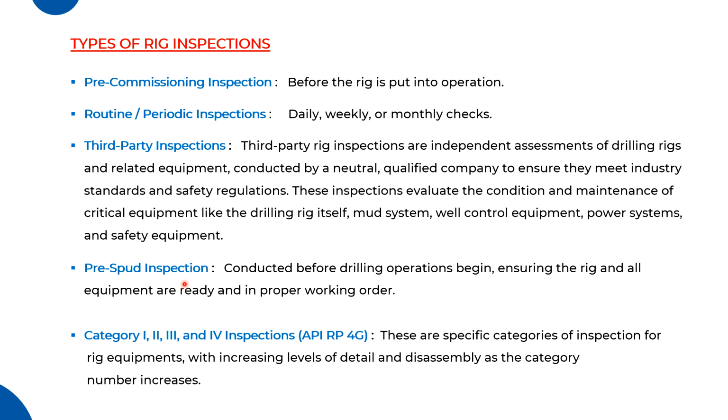So all the safety meetings and safety drills have been completed, and the incident reporting process has been introduced to the workforce. And all the workforce have a valid H2S certificate. So after finishing the pre-spud inspection, the drilling will be started there.